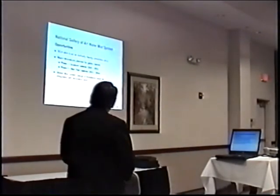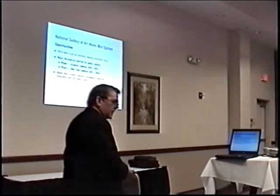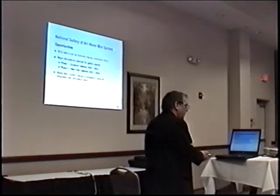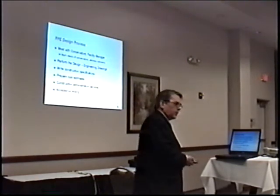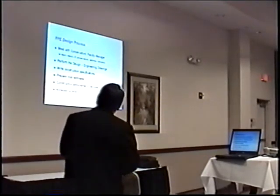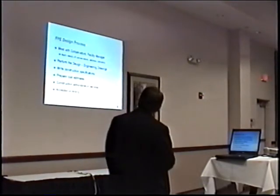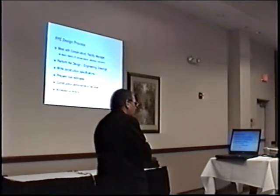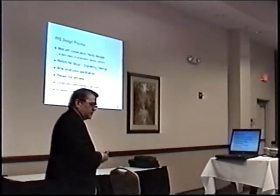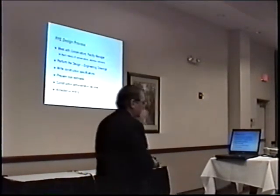Also, there was an opportunity because there was major renovations planned for these spaces. Everybody could go to work and rip some walls apart and get in behind places and do some work. So this water mist system could be integrated with the long-term plan for the improvement of these spaces. So this is where this begins to become a fire protection engineering consultants project. Actually, we had done demonstration fire tests, and we'd have people come in and hang art on the walls, and we sprayed water, and then conservators examine things and get comfortable with it.